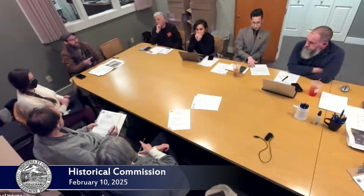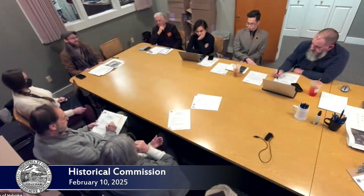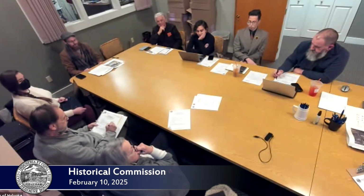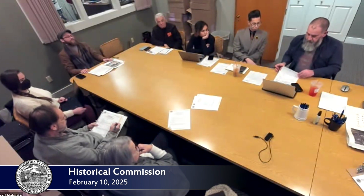My goal, until I see you again, will be to advance through closing. I know you missed this part, but each party brings in their own attorney and it's usually a 6 to 8 month process. It wants to be a 12-month process, but I try to reel it in and make it expeditiously faster. Moving parts, yes. Part of the fun though. Okay, I will rest my case and pass it over to the chair.